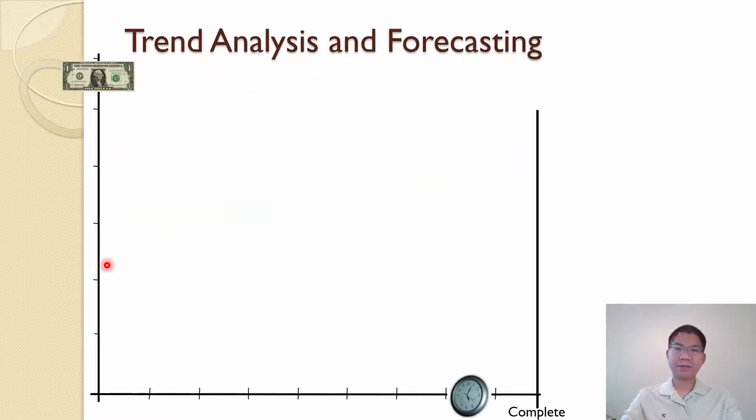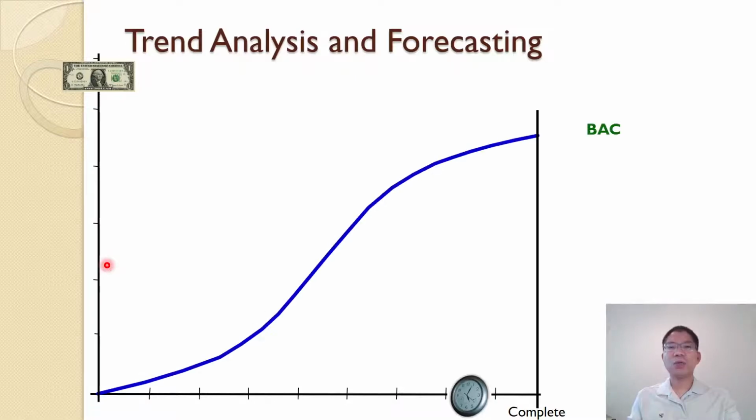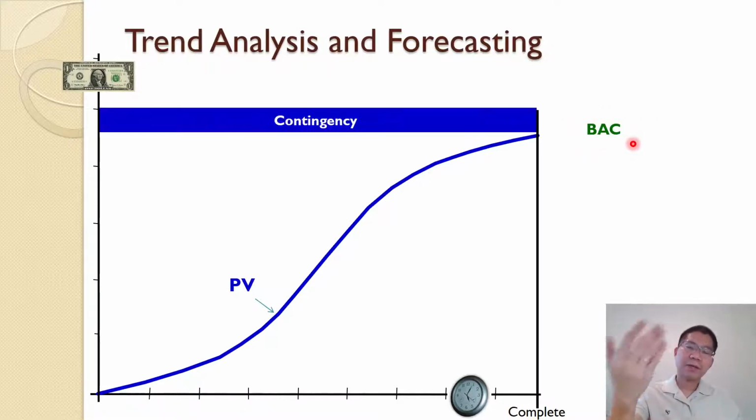And we can see the progress curve that I just showed you in the Edwardsport power plant project, the case study that I showed you throughout the semester. In this case, we can draw at the beginning the baseline, that is the planned value. And the total of the planned value we call BAC, if you recall from the previous lesson, budget at completion.